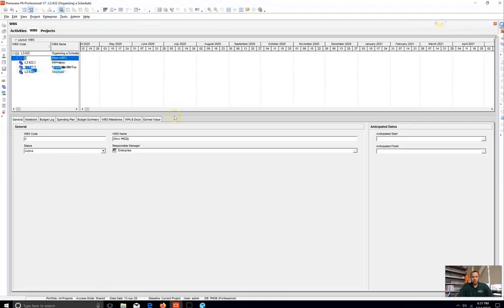And then I've also got in my building, and I like building out my envelope first, so that's really your exterior system and your roof. So once you're dried in on your building, you're going to be starting those interiors. So I'm just going to put my exterior facade.